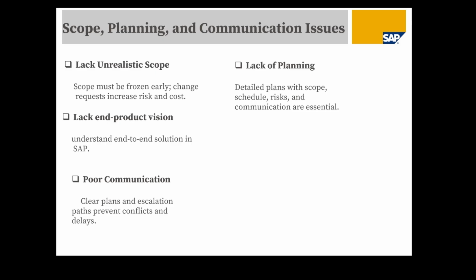A detailed project plan needs to be prepared before the project is initiated. The project plan should cover all of the scope. High-level WBS and activities will be created as per the duration of the project. Prepare project resources plan. Lack of stakeholders' responsibilities.